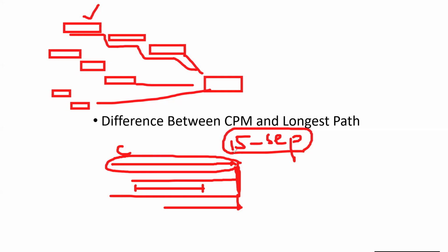Make a separate project of 10 or 15 activities to understand this logic, and give it a must-finish-by date. Make logics, and then you will find every other path is showing red color. Why is it happening? Because at project level, you have implemented one big constraint. You understand?